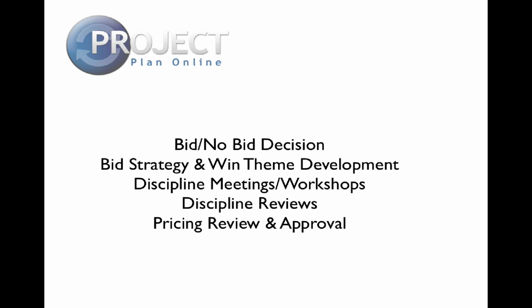Pricing review. This is where you take the final proposal to whoever is responsible for sign-off, outline the bid strategy, the work that has been done to arrive at the final proposal, and discuss and agree the final price offer.